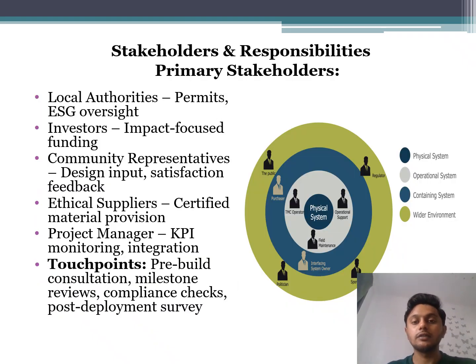Now let's talk about which stakeholders are responsible for our projects. Let me introduce, first one is our local authorities, who will grant us the access of the permits and ESG oversight. Second ones are investors, who will make sure that our ESG returns will be met, and how we get the fundings. And third one is community representatives, who, as I talked before, will give feedback and design input.